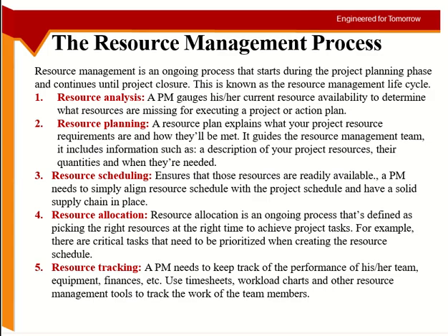Then you have resource allocation. This is now the actual process, right? I need this resource at this time on this project, so you have to get it there. If it's labor, you have to pick them up and drop them, and give them the supplies they need. If it is equipment, you have to transfer it. If it is material, you have to buy it and put it in a truck and get it to the site. So this is all part of resource allocation. This happens after scheduling.